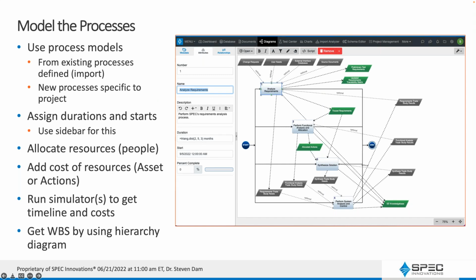So you can take your process models and create a model for each one of them. We use the inputs and outputs particularly to show what we are getting and what we are producing. So the outputs are basically our deliverables, and you can track them that way. I often have a deliverables table that I then see in my database view and use that to help me work with it and communicate it.